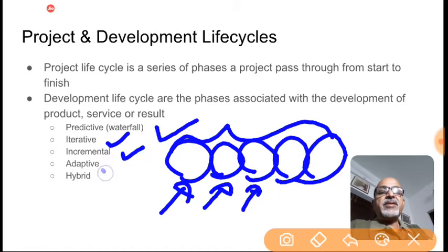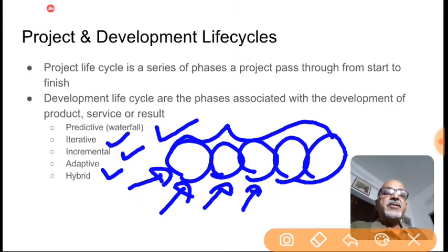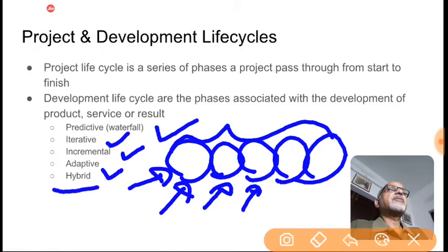And we have these adaptive styles. Again, it is based on the sprint or iteration. It is also known as the agile methods. And sometimes we follow hybrid methods, like till we have absolute clarity on the requirements and the technology, we may go agile or adaptive mode. And once we have absolute clarity on the requirements and the technology, for the rest of the project we may go with predictive styles. So a combination of these styles is possible, and that we call hybrid.